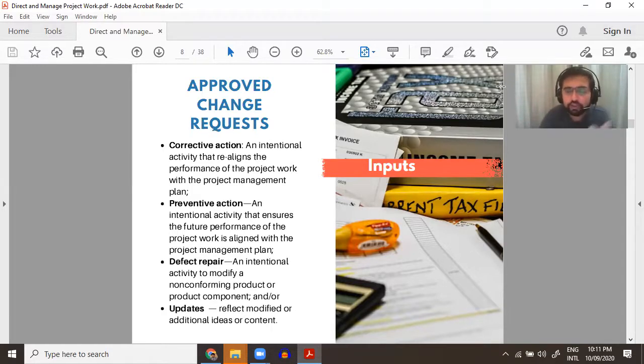And the second way: you don't check the tire daily, but you check maybe after one week, two weeks, or somebody else tells you there's a problem in the tire. You immediately go to the tire shop and get your tire repaired or get air inside your tire. This is called corrective action. In both ways, you haven't changed your baseline, and you're following the project management plan.